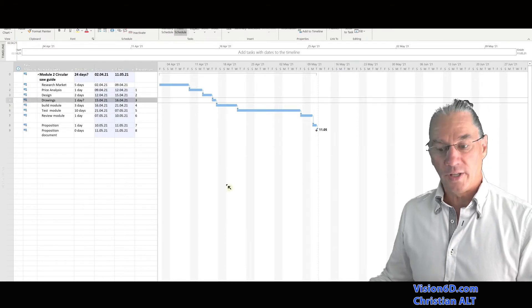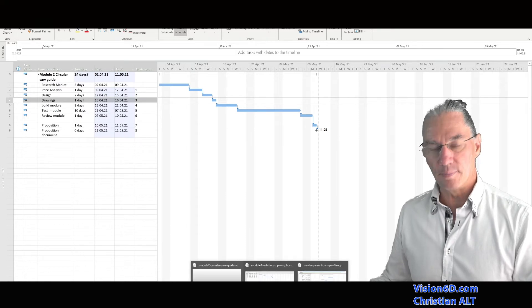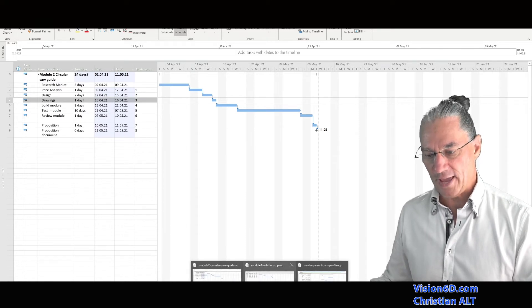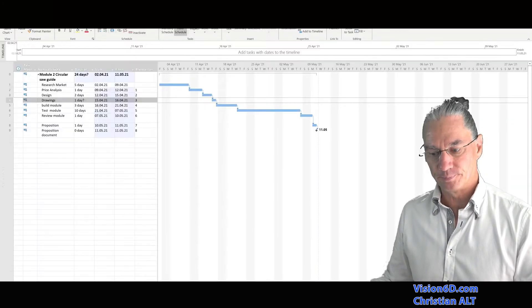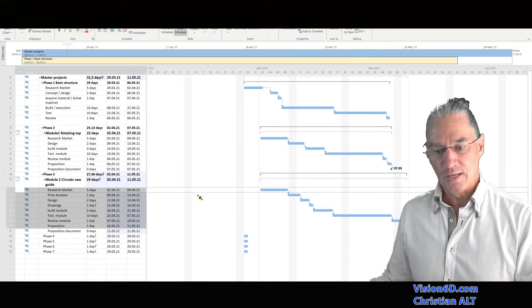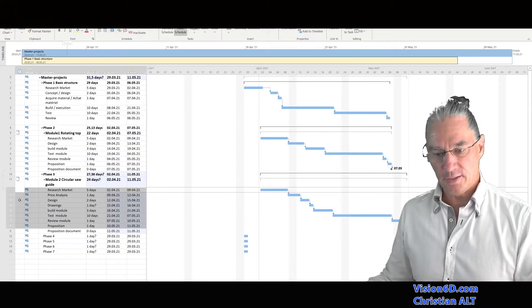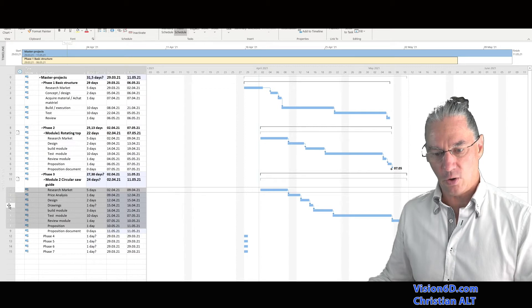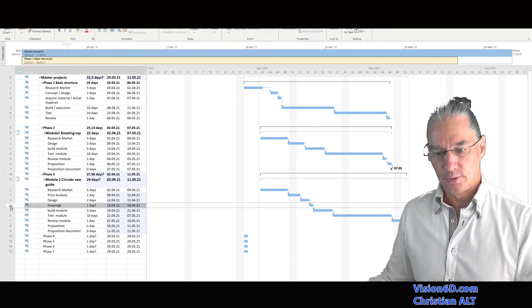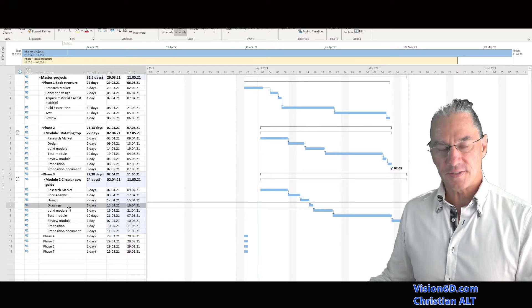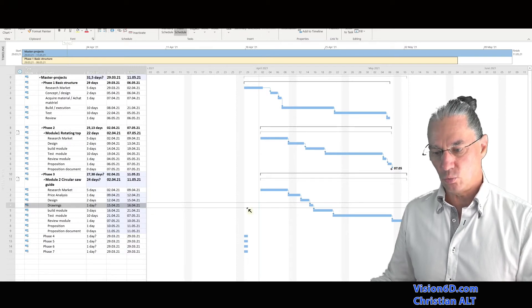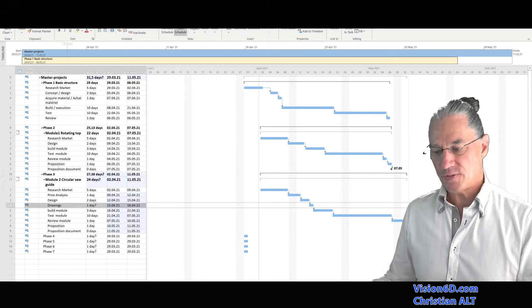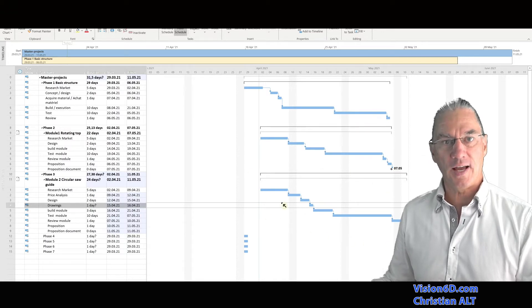So now we are going to look into the master file to see what happened in there. So in the master file, you see that we have also a task number four, which is drawing, duration one day, and everything has been rescheduled as it should.